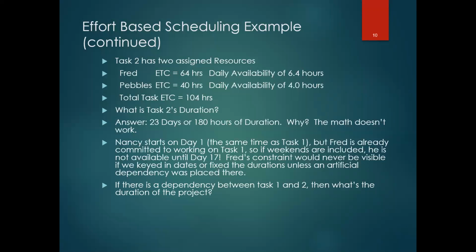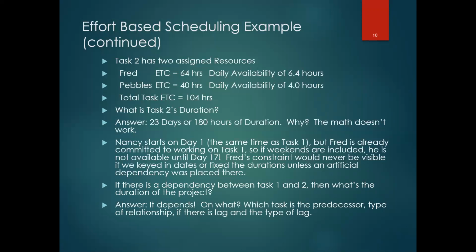If there's a dependency between task 1 and 2, I already answered this question, then what's the duration of the project? And the answer there is, it depends. On what? Which task is the predecessor, the type of relationship? Are we driving any lag? Does there have to be some lag in there? So there are myriad things to think about.